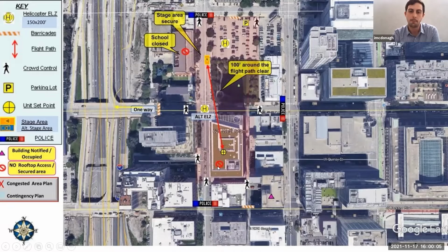So we were potentially thinking of tossing a crane on the side of the building here, and then we would have gantryed it over to this side, had to lift the crane up again, and then craned it and gantryed it over again. So with that, the crane itself would have cost probably about $15,000 between getting it up there, setting it up, taking it down, then moving it up again, resetting it up, and lifting. And that doesn't factor in the cost for our mechanical contractor to have guys there assisting as well, in addition to the cost of the landscaping that we would have most likely destroyed on the roof.